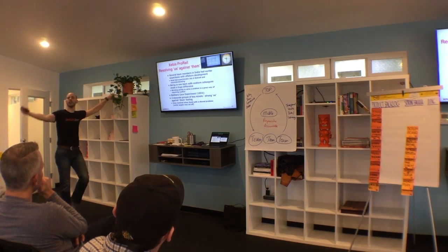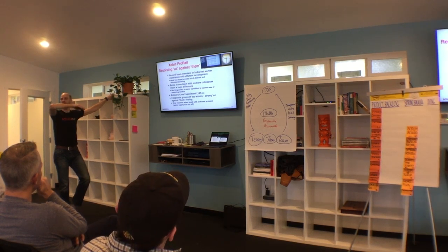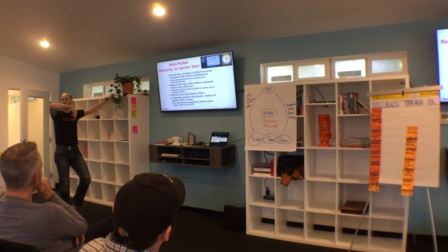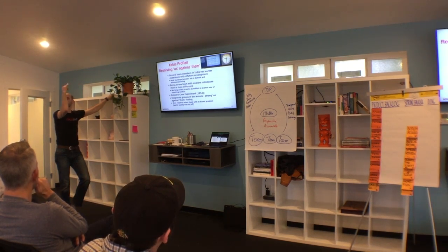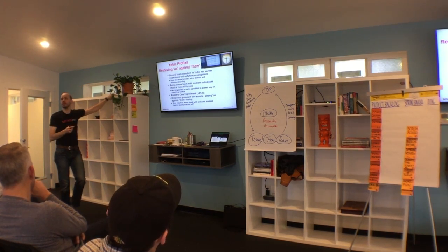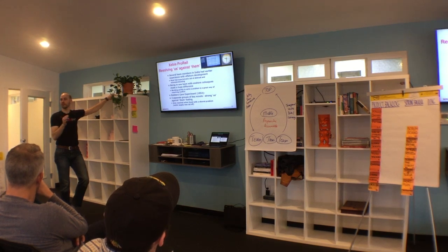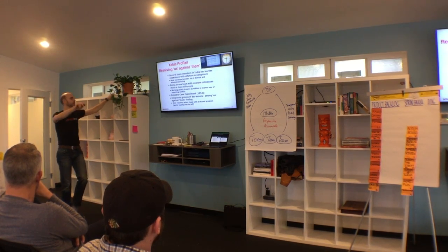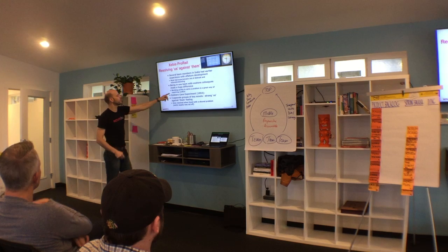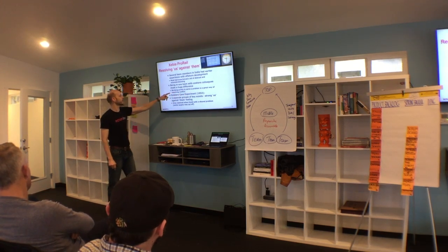They flew all the Indian teams in to the Netherlands to work co-located with the Dutch teams, well, as one team, until they established double the velocity of any previous waterfall team that had worked on the ProRail system before. Once they doubled the team, they said, we don't want to distribute bad Scrum, so let's not fly anyone back until they're double the speed any waterfall team has had on this project. Then they flew the Indian developers back to India. Working jointly to solve a problem is a great way to resolve conflict.